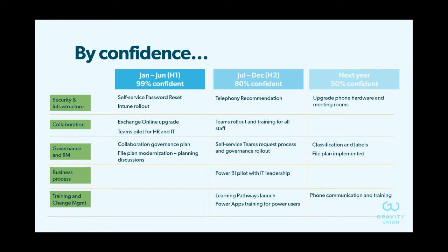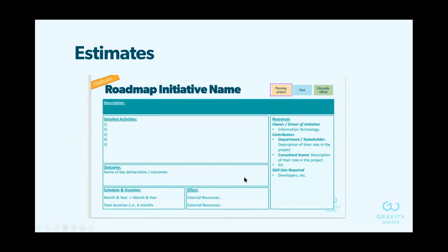Just presenting them in different ways can help people understand the roadmap depending on what their priority is, what they care about. So it's a useful way to think about breaking up your roadmap. As well, with organizations very heavily focused on projects, where there's a start and an end to projects, we sometimes present these one-page estimates for each project. So for each box or item on the roadmap, estimating it, describing it, giving people more detail who want it. This is not necessarily something that is on that one-pager. This can be supplemental info to help a committee or a budget team plan for what's coming.